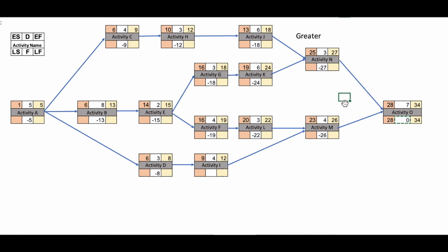So don't get confused because we have to still enter late finish and late start. Here activity M, so late finish will be 28 minus 1. So before we were doing plus 1, when we are using backward path minus 1. So same formula we will use as activity O, so we'll paste here.